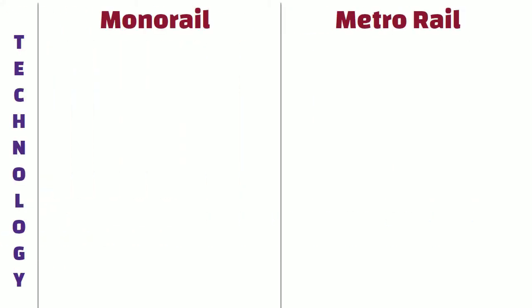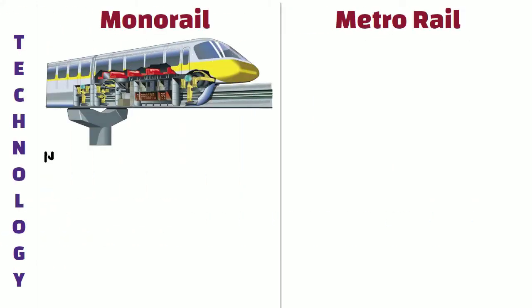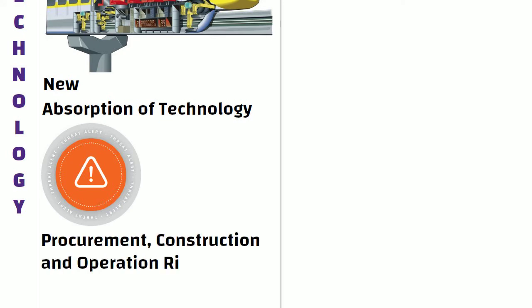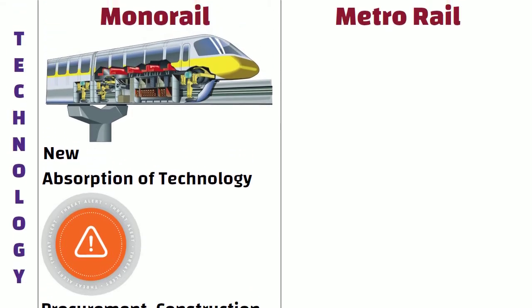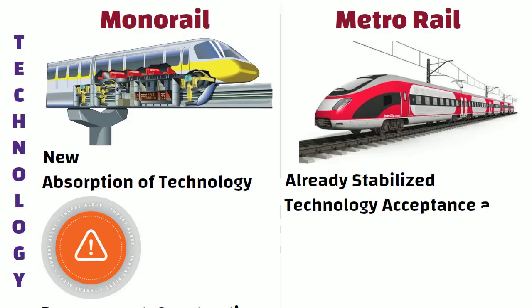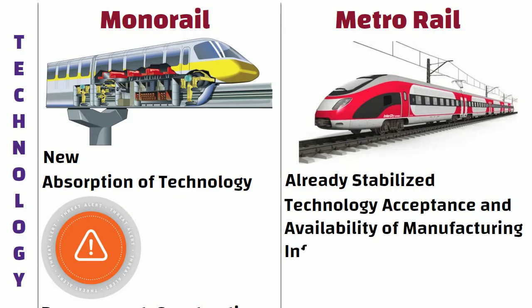Technology. Monorail technology is new to the country and hence absorption of technology could pose a bigger threat. Procurement, construction, and operation risks in monorail are higher. Whereas metro systems in the country are already stabilized as far as technology acceptance and availability of manufacturing infrastructure for spare parts, etc.